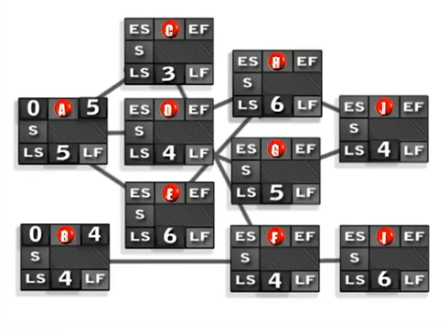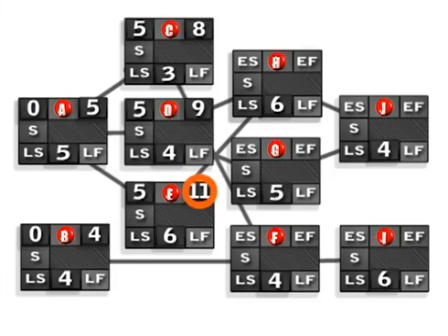Now we're looking at this diagram and we see out of activity A that we have 3 arrows. We don't have to make any choice. We automatically know that the early start for each one of those activities is going to be 5. Again, we calculate the early finish. 5 plus 3 is 8, 5 plus 4 is 9, 5 plus 6 is 11.